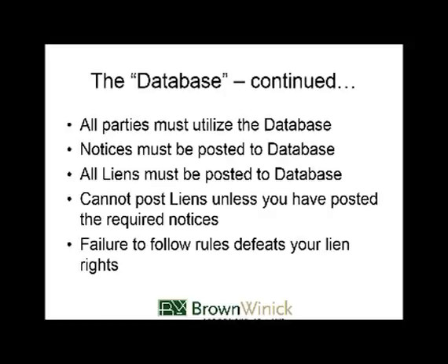The biggest change from before to now is that if you fail to follow either the posting of certain notices or the posting of your liens, it will defeat your lien rights. Before, there was a lot of leeway given to courts to allow late-filed liens or liens that weren't technically in compliance with the statute.